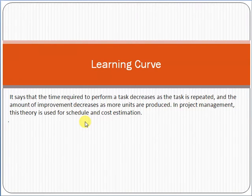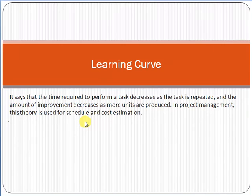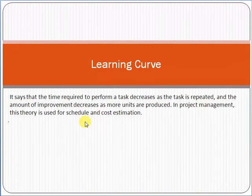Try to understand this from a simple example. When you were a child and you started riding a bicycle for the first time, it was very difficult. But once you tried it multiple times, after a few months it became so easy that you feel no difficulty riding a cycle at all. This is the concept of learning curve — the time required to perform a task decreases as the task is repeated.